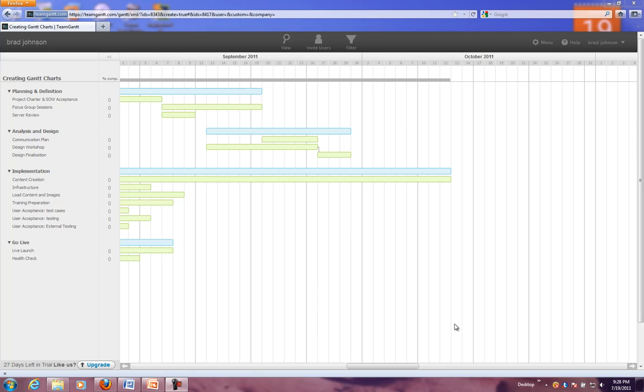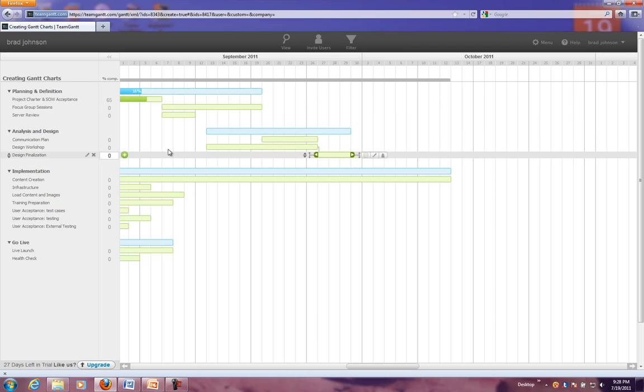Well, you can use a Gantt chart to help with your planning of the project, planning and organization and so on. Something else you can do with the Gantt, and a common use for it, is to track progress through the project. Now, let's just have a look up here, and let's say that that's about 65% done. Well, that's only 16% of phase 1, but it's 65% of that task. So we're getting close to being done, but now we can't do anything else until these are done.